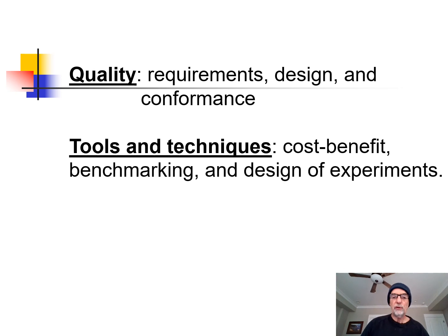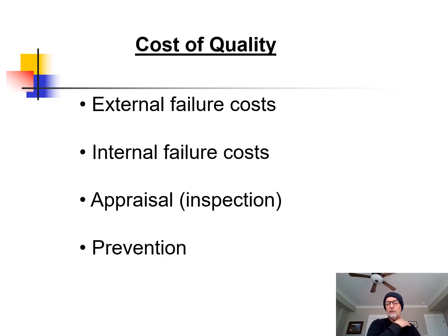And you also want to look at the tools and techniques that you can use to evaluate quality, looking at cost-benefit analysis, benchmarking, where you're comparing your quality to other projects or other companies, and design of experiments, which is looking at evaluating a series of variables all at the same time. The cost of quality is something that's important to measure. The worst quality cost is an external failure, where your project can cause a big problem after it's done and it's in the customer's hands.